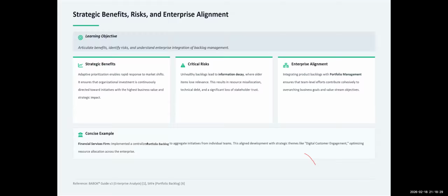Are we looking for items that have spent more than 10 weeks? If it has spent more than 10 weeks, it means only one thing: that item is not required. It's not important to whoever logged it, because an item cannot be there for as much as 10 weeks. I'm just using an example.